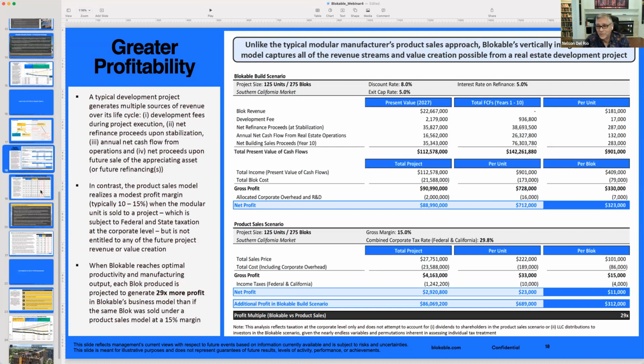And I don't care how long they've been talking to me. I don't care how much help they put in. If they come in 10, 20% higher than the person who bid it on the same exact specs, the lowest bidder wins.